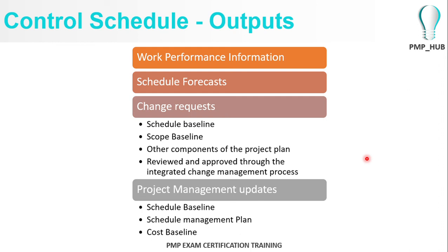In whatever instances, any change request or any changes to your scope or schedule or the cost baseline need to go through the integrated change management process.